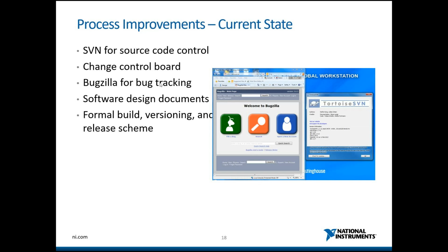One of the problems we ran into was that even with a bug tracking system, it's not enough to just put bugs in there. You have to have some sort of process for moving them out of the queue and into developers. What would happen is one person would enter a bug and assign it to an engineer, and the developer would go do it. The next engineer would look at the final product and say, that's not right, and put in a bug to change it back. And we'd go back and forth.